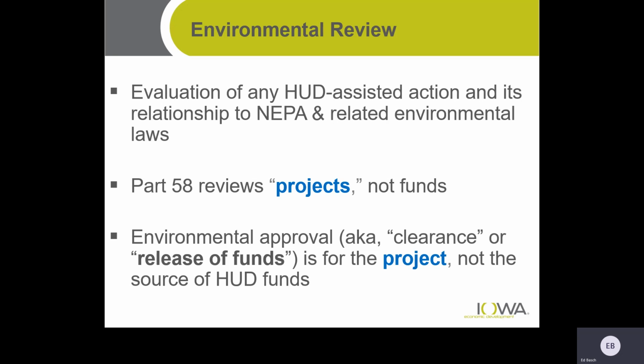So keep in mind that when you're talking environmental review, it is reviewing the project and not funds. It does not go with the CDBG funds or funds from any other source. It's the entire project. So when you receive clearance on that project, it is, again, the entire scope of the project, not just any particular funding source.